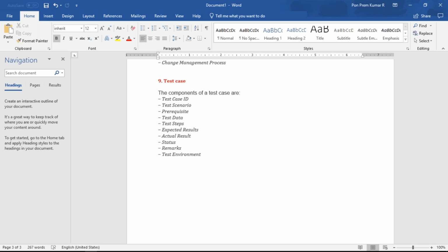What else? There is another document which is not meant for the BA. It is the impact analysis document. That's for your company's management. Normally, the impact analysis document captures the details of changes, including the value of the project, impact on the time frame, and cost. Sometimes a new change may cost additional. The IT service company may charge an additional amount for the new changes. So the impact analysis document is for the IT company management.